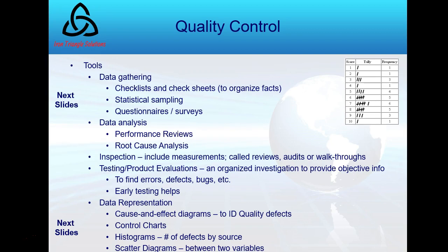Because my boss had me spending a lot of time studying delays and briefing them monthly. And after 3 months of data collection with a tally sheet, I determined that 95% of all delays were outside of our control, and that we were spending a lot of time managing something that wasn't our fault. The delays were due to weather, which was outside of our control.